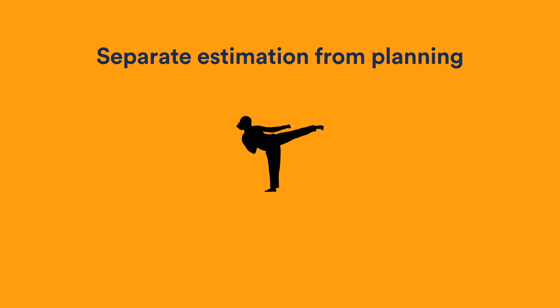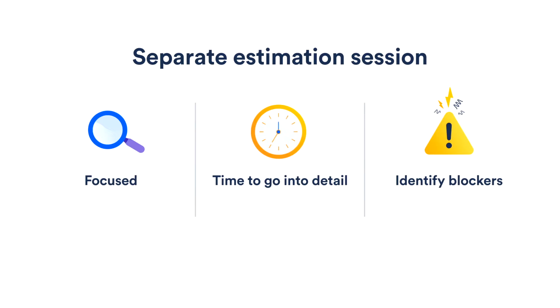So they could have a lot more focus in that meeting and they could actually do deeper dives into technical problems, open up code, etc. They were also a lot less rushed because there were fewer disciplines in the room. So they could really focus on looking at the estimates for those tasks and less on explaining things to non-technical people, for example. They do this several days before the actual planning session, and that lets them identify some of the blockers that may come up.